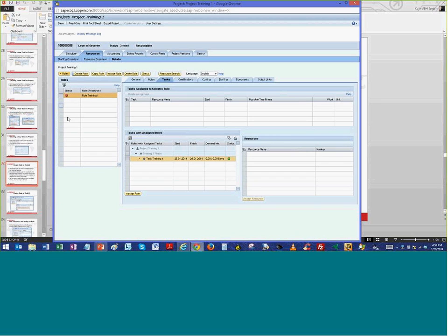See, this is actually an important thing to figure out because it's not intuitive, that these gray boxes are your boxes. You select something. I have multiple rows in here that I want to assign. Created more than one here. Then I can select multiple roles and select them here. One of the things I need to find out is that you need a role for every individual that you're assigning.